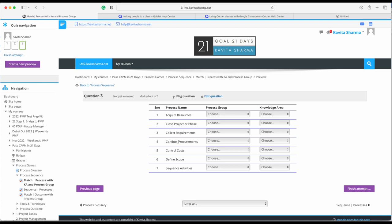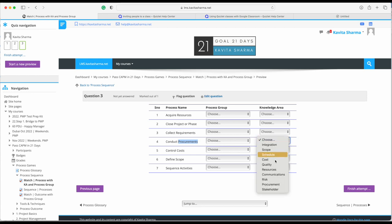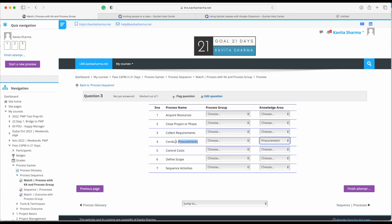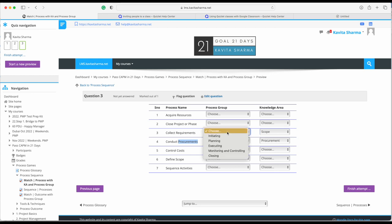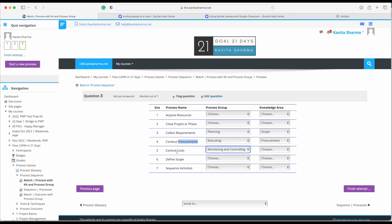For example, 'Conduct Procurement' — you have the keyword 'procurement' here, so obviously the knowledge area is Procurement. 'Conduct' is a keyword; generally all the continuous verbs signifying we are doing something right now are part of the Executing process group. 'Collect' is Planning, so 'Collect Requirements' — Requirements belongs to Scope and Collect belongs to Planning. 'Control' belongs to the Monitoring and Controlling process group, and 'Cost' is the knowledge area.